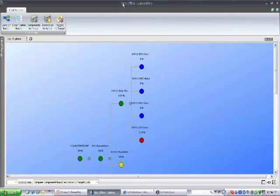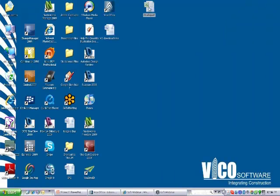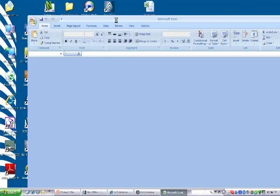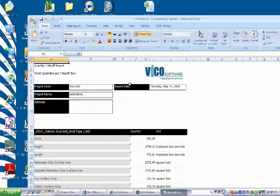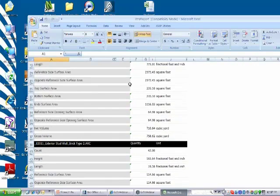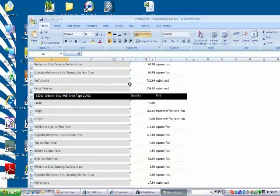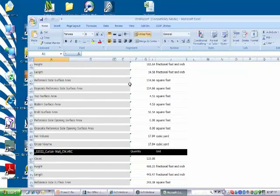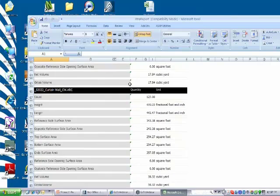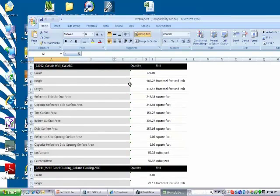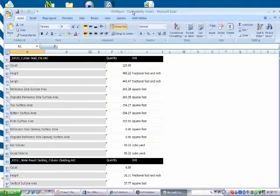And finally, you can generate different kinds of reports. In this case, I just generated a report in an Excel spreadsheet where you can see the list of quantities exported from the EcoEnvironment that you can import into other estimating systems if you would like to use another estimating system for final pricing or use it as a printout and include it in your GMP. So that's the process in a nutshell.